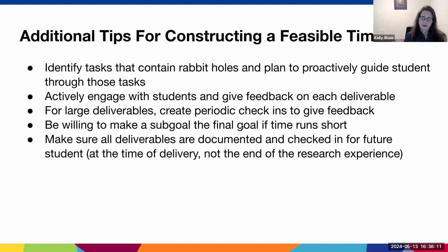And then a really key component here is you want to make sure that all of the deliverables are documented and checked in for a future student, where the future student could be the student who's just forgotten what they've done in the past, at the time that they deliver that deliverable to you, not at the end of the research experience. One, they'll forget stuff by the end of the research experience, but two, you want to make sure that if something happens with the student and they can't finish the research experience, you have everything documented and ready to go for the next student's research experience.